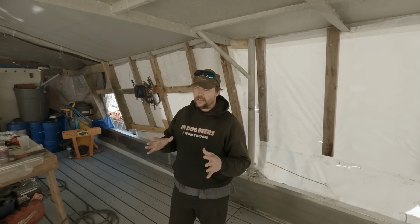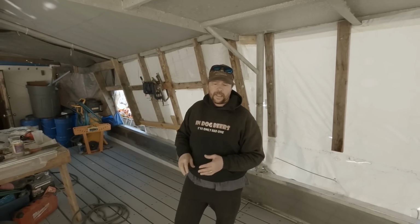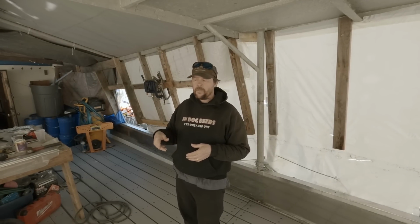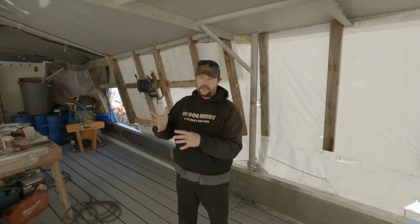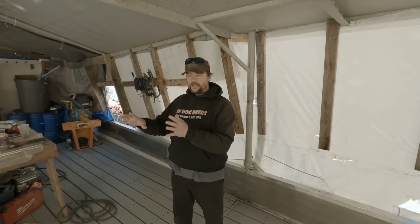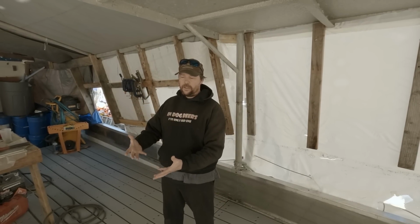Currently we're a little over 20,000 right now, which is more than half of what we need to do this project in its entirety. We didn't really talk about cost that much, but the blast freezer itself is $30,000, and that's not including shipping, which is probably going to be about $1,000 to ship it up here. As far as the rest of the things that need to go with that to get it up and running, it's very little. It's quite literally a 4-wire extension cord that'll plug into the back of the house, provide the compressor and condenser pump with 3-phase power from our generator, and then also a water line for the condenser, which has its own pump to supply the condenser with seawater. That basically removes the heat from the refrigerant, ejects it overboard, and that's how you cool the fish and freeze it.